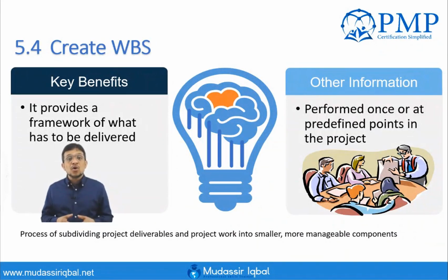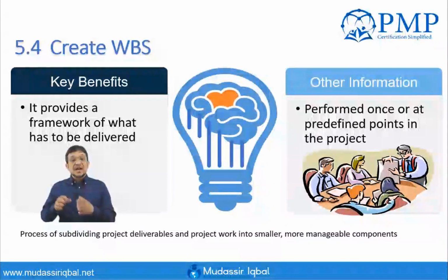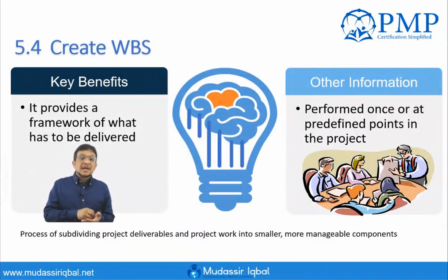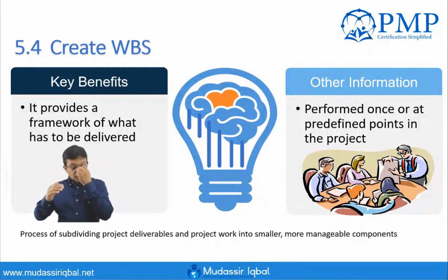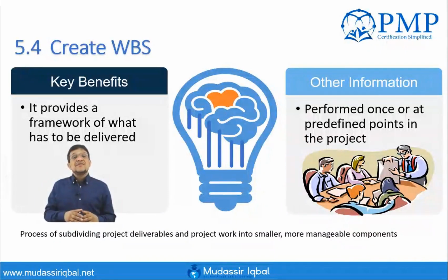It is a breakdown of our objectives and strategies into small manageable units where you can identify the person responsible for each, and we will go into the depth that is necessary and sufficient for the completion of the corresponding higher level deliverables. So we will keep on dividing to a level where we feel it is more than enough, and going further will only add cost or problems. It will add to the timeline, and you will not gain anything.